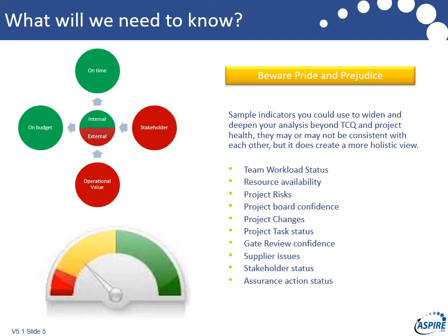So with that perspective, we need to really have independent challenge and verification. It's very easy to wind a red status down to an amber. Nobody tends to worry about ambers that much, right? So the amount of times we do P3M3 assessments and we see an amber or a green project, and as soon as we open it up, it's got a red risk. How can a project be amber or green if it's got a red risk? Because a red risk means it's going to kill it.